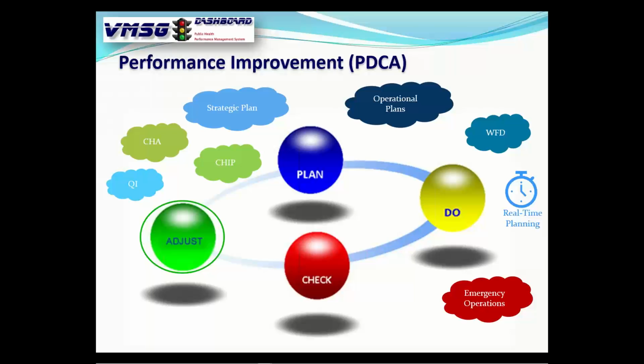And I mentioned the fourth scenario. The fourth scenario is very common, and that is that maybe we overestimated on the plan a little bit here, yet we also need more resources to get there. So in this case, let's say we take the plan to 17, we put Bill in there, we give Bill some more time, and let's go ahead and bring in an external contractor just to help Bill get ramped up to speed pretty quickly here.